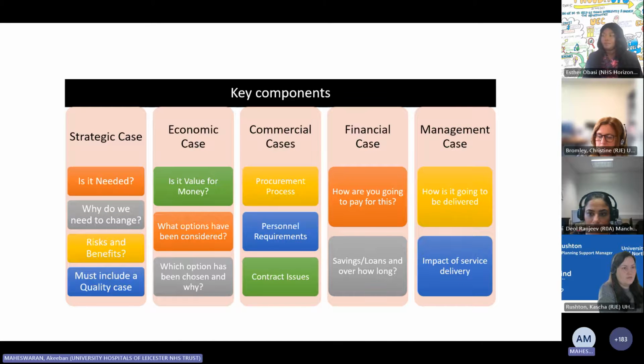You've got to look at what the upfront cost is versus the ongoing cost, and it depends on your use. You might have a bit of kit that has a big upfront cost, but a very low ongoing consumable cost, and that's great if you're a high user. If you're going to use the consumables loads and loads, then that might work out cheaper over the length of the contract.